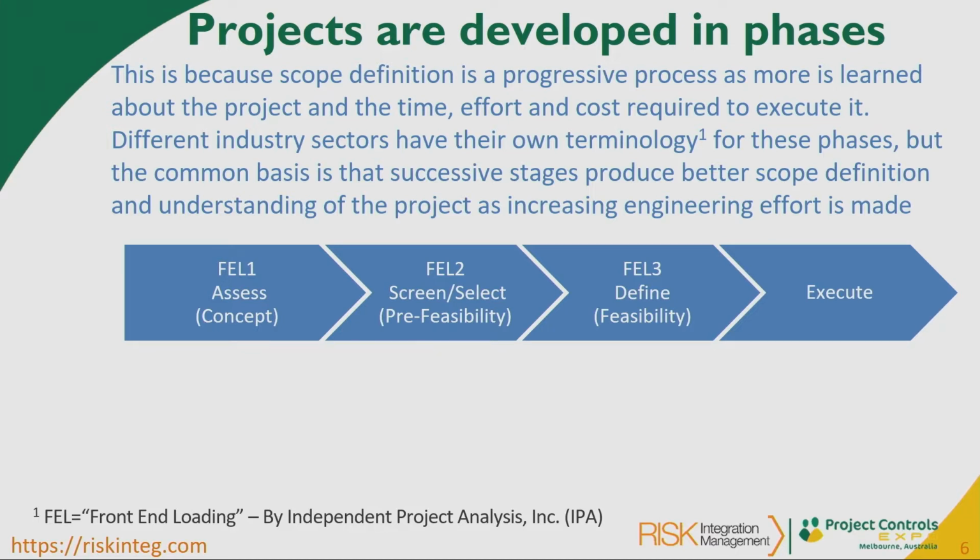The top one is by a company called Independent Project Analysis Inc., and they call the process front-end loading, which is a peculiar term. FEL 1 is at the very beginning, the concept phase, when you're assessing what it is that you're trying to do.